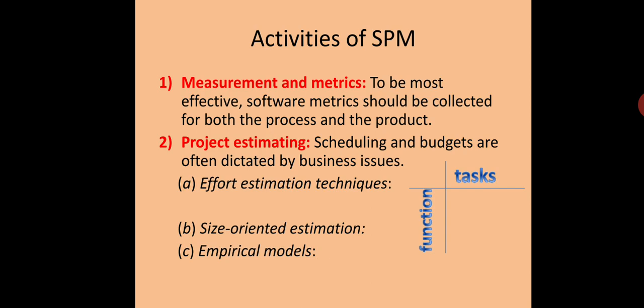Now the manager, obviously with the assistance of technical staff, estimates the effort required to accomplish each task for each function. So this can provide you a good way of going about effort estimation. You just form a matrix to see how much effort is required to accomplish each task for each function.